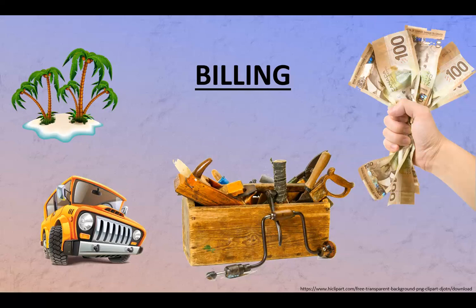And then as soon as the equipment is delivered, you need to have a check for a certain amount of money that will cover the equipment plus maybe your markup on it, right? So you already have made money, but if you don't get the check, you take the equipment back to the distributor. That's how you can do bigger jobs without having a big bank account, right?